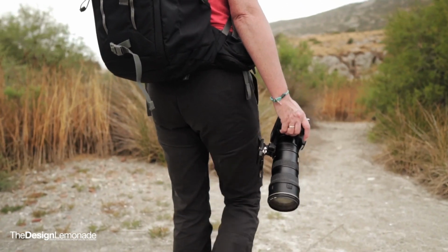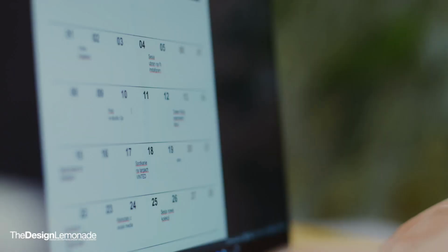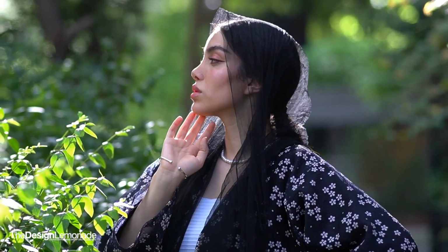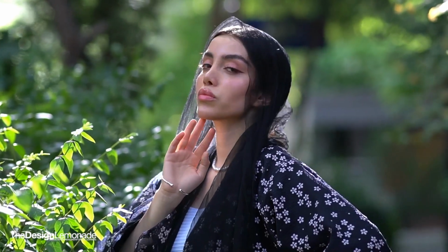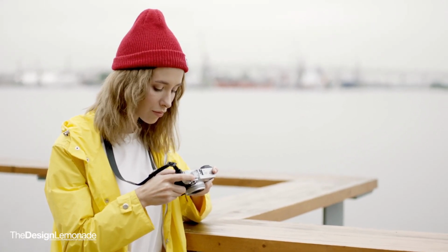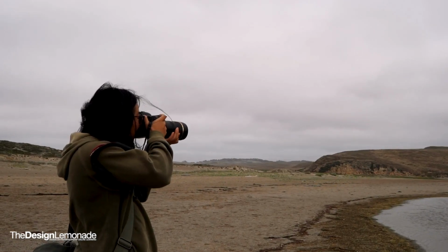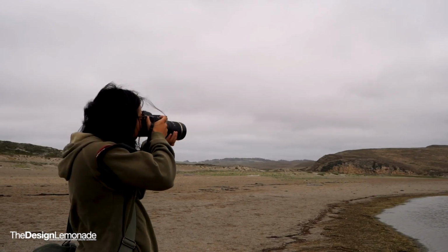A photographer is hired for a complex outdoor product shoot that is highly dependent on weather. They break down the shooting day. Optimistic: perfect weather, great light, everything wrapped in 6 hours. Pessimistic: rain delays, difficult lighting, reshoots needed, taking 12 hours. Most likely: a few minor delays, decent weather, taking about 8 hours.